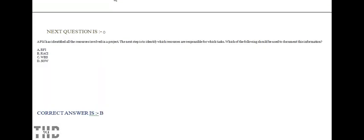The PM has identified all the resources involved in a project. The next step is to identify which resources are responsible for which task. Which of the following should be used to document this information? Option A: RFI. Option B: RACI. Option C: WBS. Option D: SOW. The correct answer is Option B.